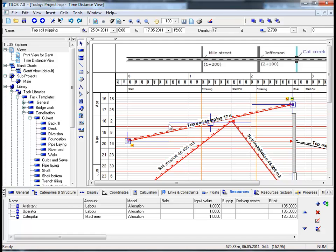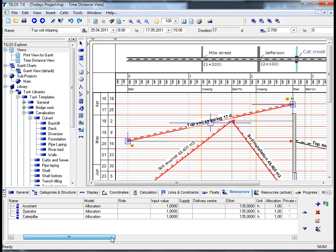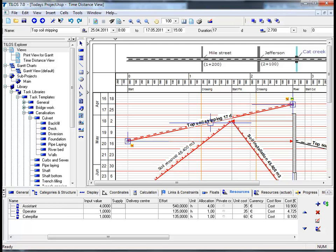If we take a closer look at the details toolbar at the bottom of our screen, we can see that the calculation model I have applied is the allocation model. This calculation formula is the easiest and simplest way to calculate costs based on the input value and the effort. I will move the scroll bar along the bottom slightly to improve visibility. By changing the input value to 4 as opposed to 1 and hitting return, look at the column cost on your far right-hand side—by entering the input value 4, my costs have quadrupled to 18,900 euros.